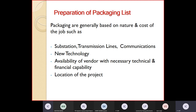New technology means nowadays a lot of new technology is coming - like BESS, battery energy storage systems, SBDC, and cyber security. For new technology, packaging could be done differently because we have to find an agency which is expert in that field. The availability of vendors with necessary technical and financial capacity and the location of the project are also considered.